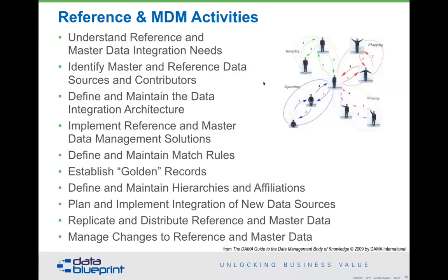But you need an objective way of determining scope. In this case, for this healthcare organization, if you were a physician with admitting privileges at the hospital, that was their definition, then you were part of this first rollout of master data management. So as you bring in next sources, if the hospital merges with or buys another hospital, gee, that never happens in the healthcare world, now you know how to integrate that information with your existing sources.